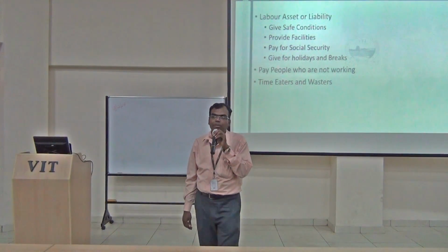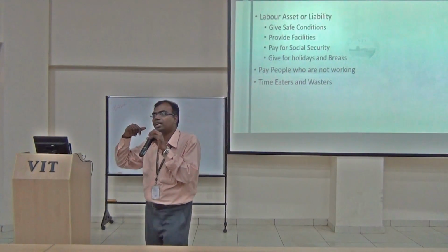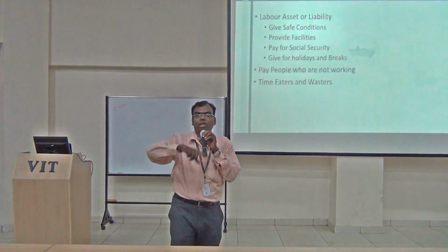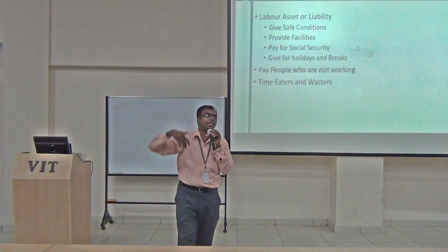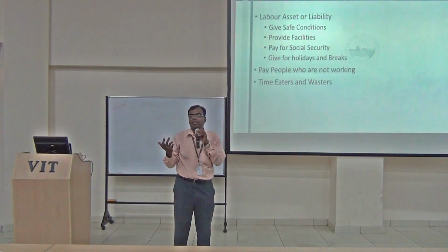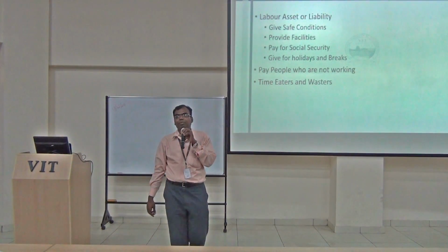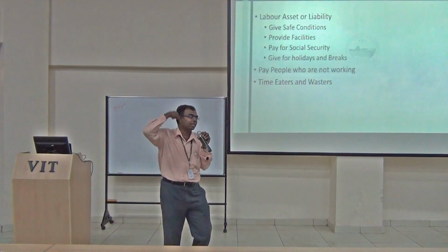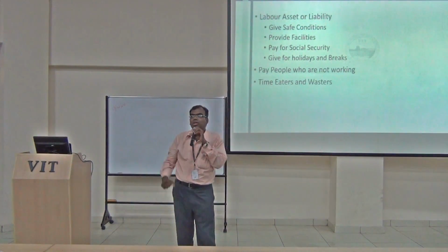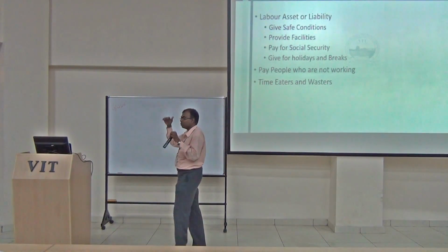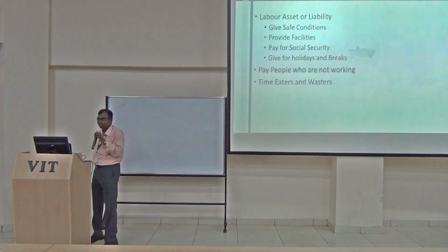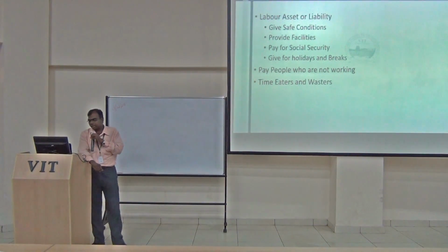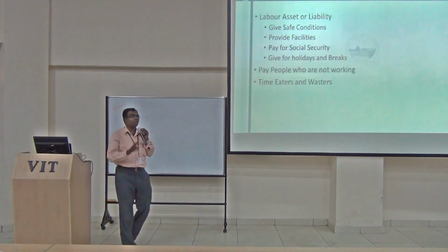Again, if suppose there is a huge labor force, the amount of safety equipment that you are going to have is going to increase that much more. Suppose you are going to put a net, and you are going to expect 100 people to fall down, how will the net be when compared to that for 10 people working at a height? Same thing goes with the full body harness. They have to take that harness, attach it to some place. So if more people are going to do the work at the same level, you are going to invest that much more in safety gear.